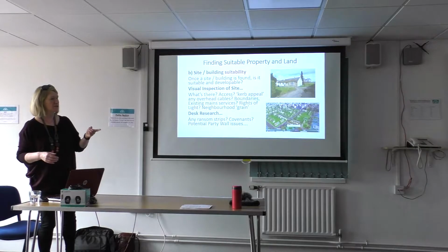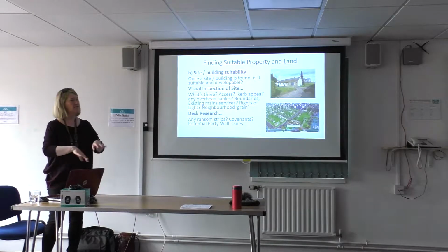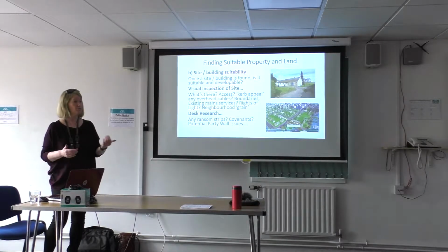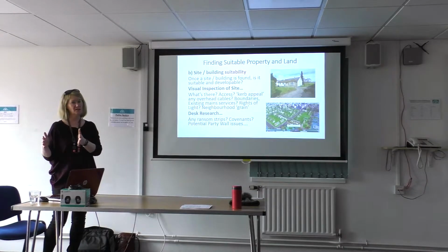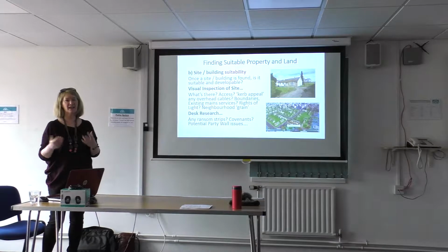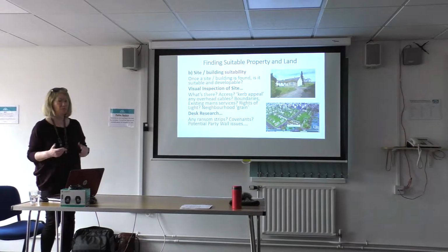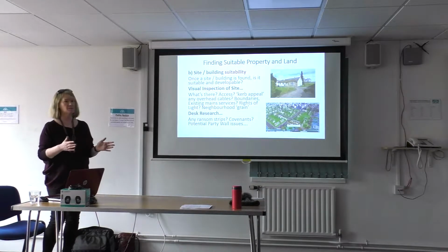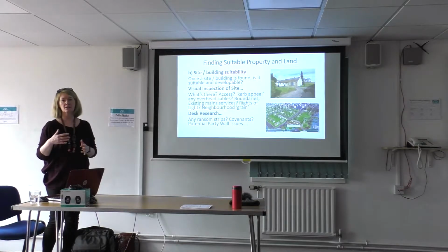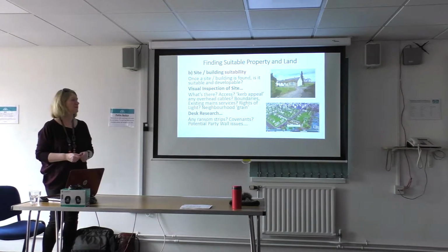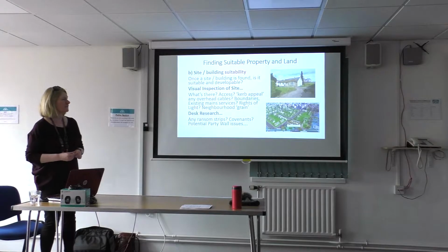We had a look at a site, didn't we, Andrea, where it was a lovely site at the back of someone's house, but there was only about 1.5 metres down the side. So probably to develop that, you would have needed to have knocked down the extension on the side of the kitchen. So, things like that are quite important. And a lot of schemes, I mean, Neil will tell you, a lot of schemes are scuppered by the fact that the access isn't suitable. So it's definitely well worth looking at that.